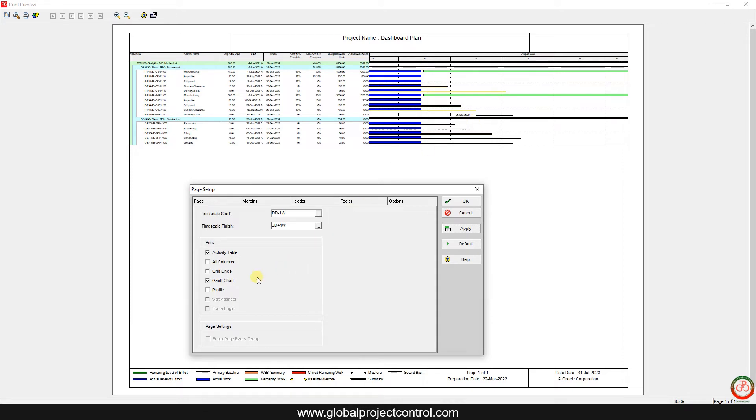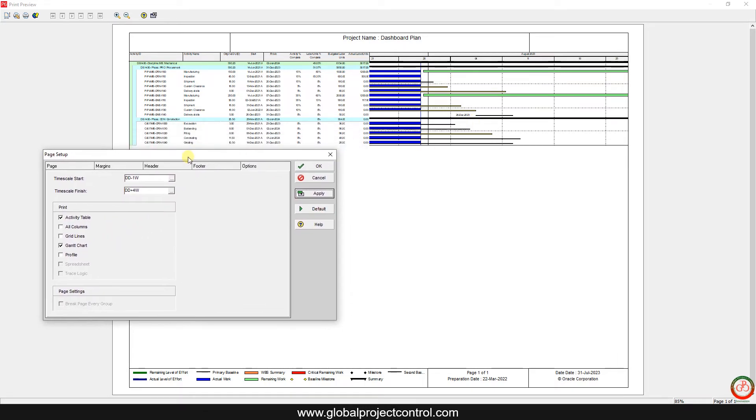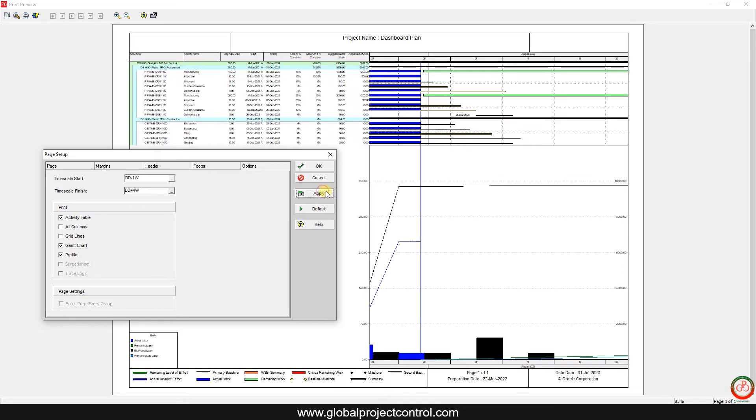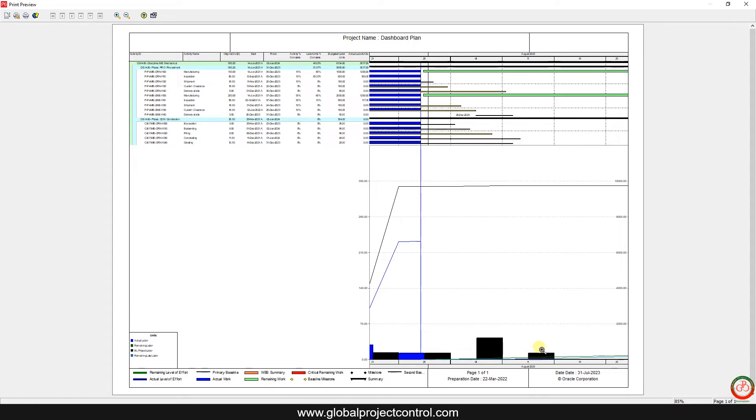If you want to know what's this curve actually in this look-ahead plan, then you need to select the profile and apply it. Then you have the profile over here. Here is the profile, here is the S curve for cumulative for the baseline and for each week estimation S curve based on the baseline and what is the actual S curve. Also we can add the remaining early and remaining late. Now we have these two items in a cumulative, but you can add it for the time interval for each week.